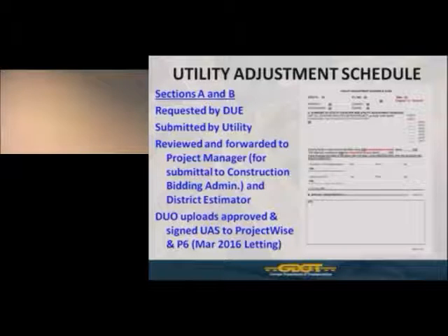It goes to the district estimator for them to use in developing the overall project contract time. And if the utilities adversely affect the expected contract time, then there's coordination efforts there to adjust the contract time in accordance with the submitted utility adjustment schedules.